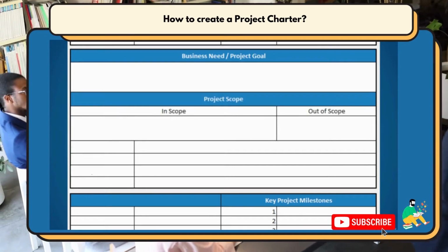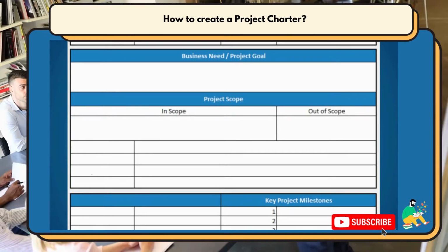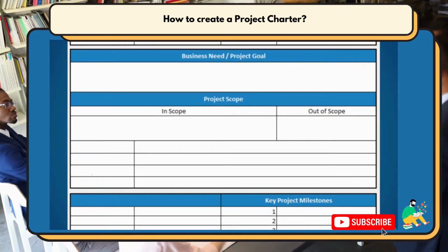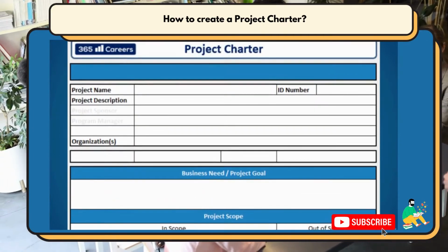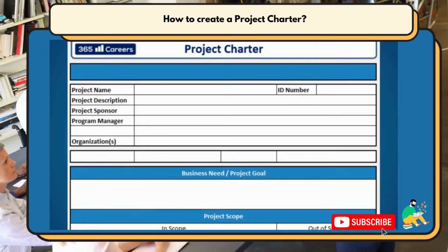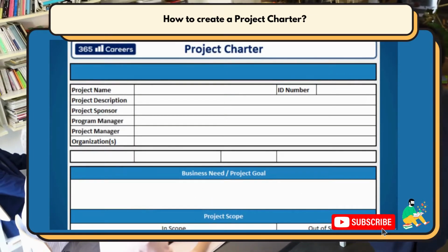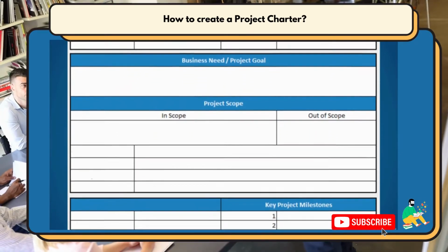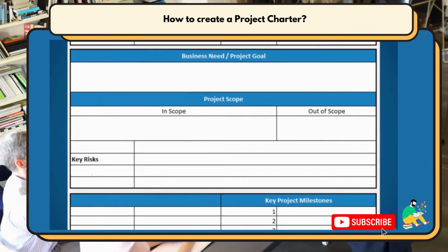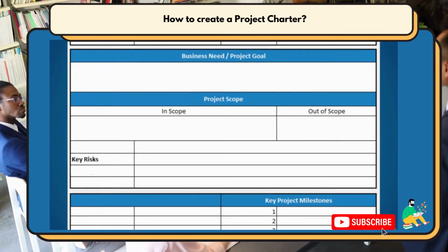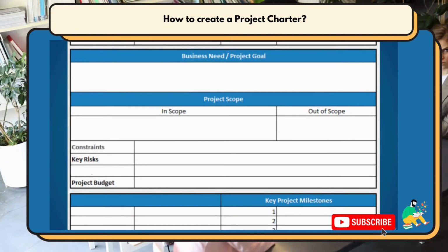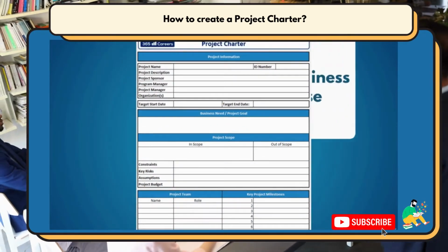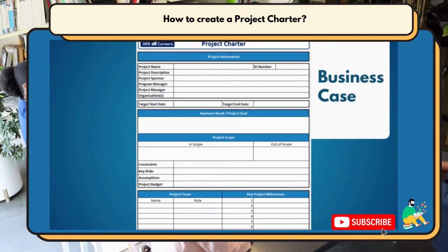The project scope is more key information that can be seen here. It says what is covered by the project. Here we have a list of key stakeholders, clients, sponsors, and the project manager. Why are they involved and how are they impacted? Also include a section for the main risks and how to prepare for them. And then budget. What are the constraints and who grants the finances? You can also add the business case as an attachment if need be.